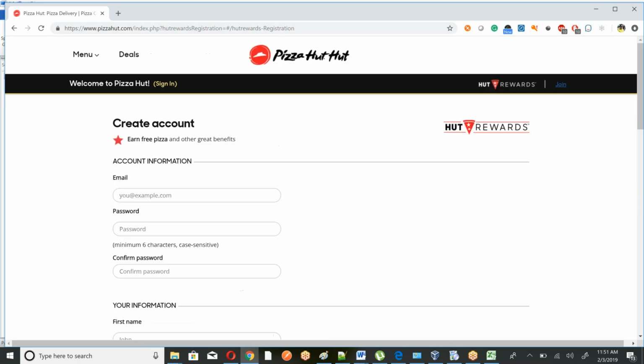So when they assign it to the developer, maybe they put this one for 5 points or maybe 8 points. Create account for 8 points, and login functionality they might put for 2 points or 3 points. So 3 points and 8 points. And that will determine whether you are overloaded or in range, because we know our sprint could be 12 points, not more than that.